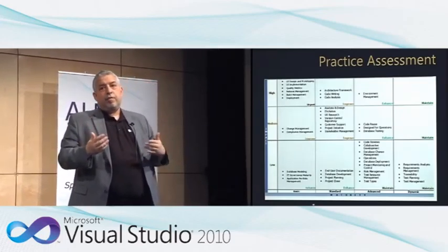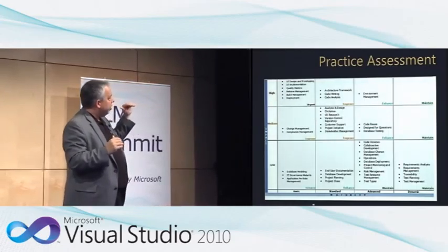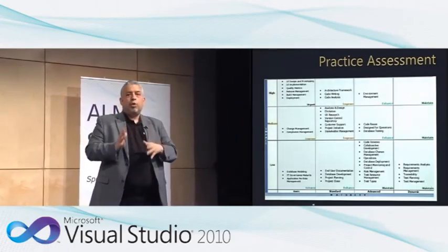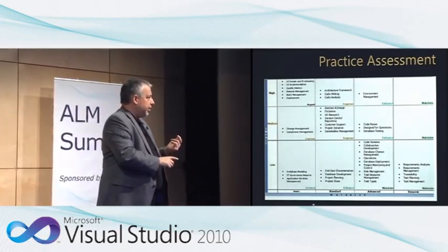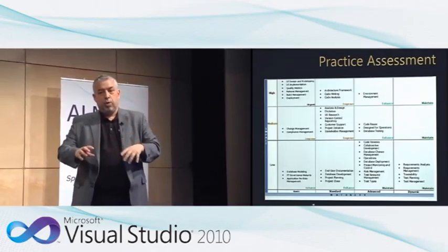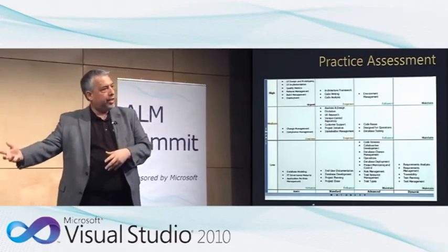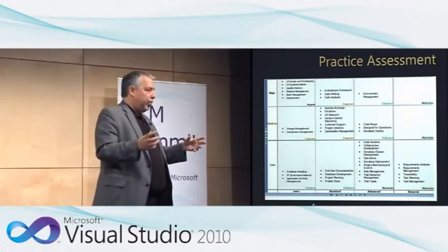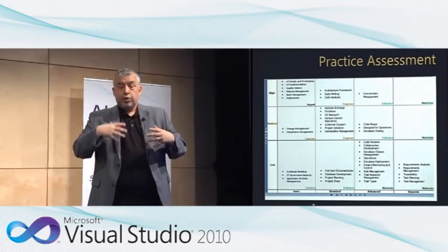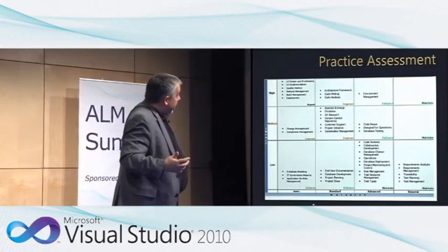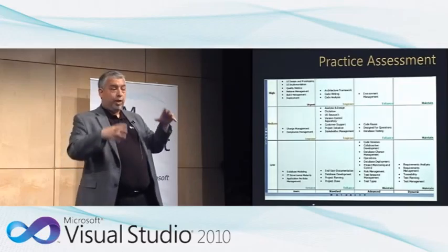The idea is that you look at the various practices you have in development. There's something like 53. And for each of them, you actually can look at what's our current maturity level from a process organizational perspective. So are we using the same process on different teams? Is what a team is using actually feeding the next practice and the next workers? Are we using the same vocabularies? Do we have metrics on them? Is it repeatable? So the idea, again, is we can look at, on the x-axis, the level of maturity that you have for a given practice.